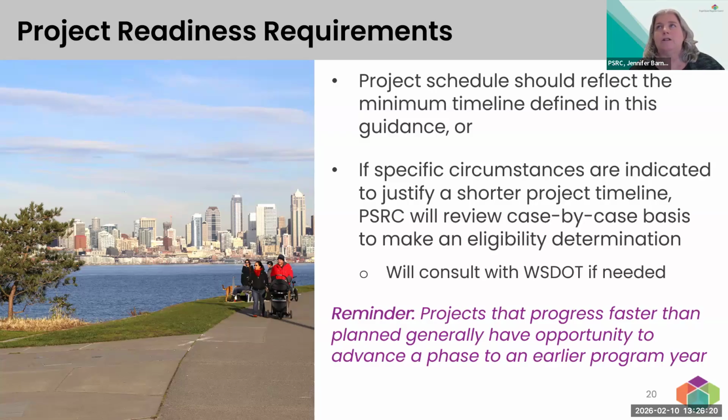If the schedule is tighter than our minimum guidelines, we then review the reason for that. We usually would circle back to the sponsor just to make sure we have complete clarity on what the situation is. And if there are still questions, we would consult with WSDOT. So we're just trying, to the best of everybody's ability, to make sure that project schedules are as realistic as possible so that we can be as comfortable as possible that the funds will be ready to be obligated in the year they are requested.